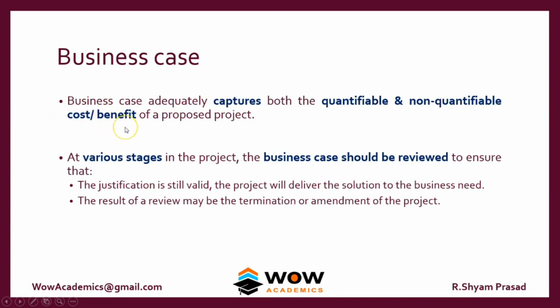So what is the use of a business case? It's used in two ways. At various stages in the project, the business case should be reviewed to ensure that the justification is still valid, and the project will deliver the solution the business needs. So at the time of starting the project, we should have a business case, and once the project has been started, it has to be compared with the business case to see whether the project will deliver the intended benefit. So that is the use of a business case.